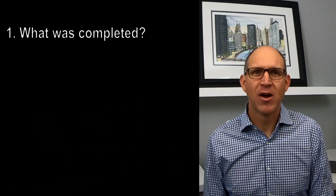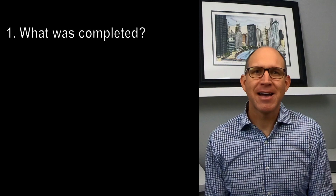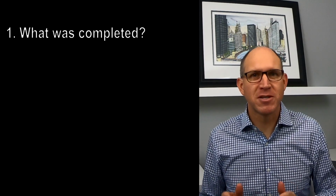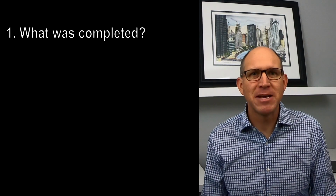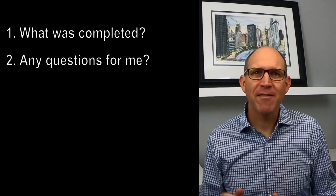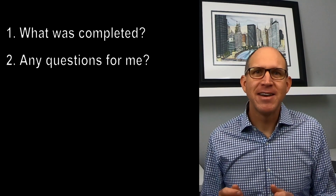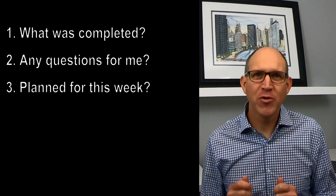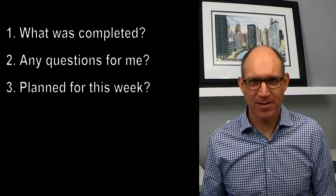Each time you visit, you should walk the entire job site and ask the contractor some form of the following questions. First, what was completed since the last time I visited? You should inspect this work to ensure it was completed per the project scope and meets your quality expectations. Second, do you have any questions or issues that need to be addressed now? Third, what are you doing this week and next week?